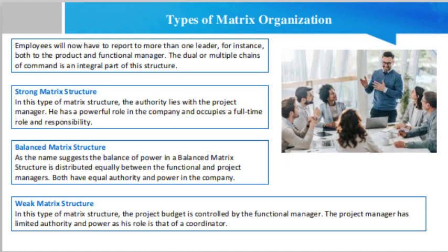There is a conflict between management goals of functional management and project objectives. The functional manager gives importance to technical excellence even if it is at the cost of a schedule, whereas the project manager gives importance to cost and time constraints. Sometimes the conflict in the matrix organization can become personal and actually lead to sabotage of projects.